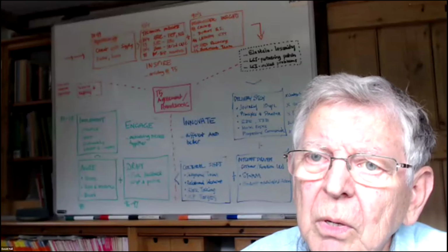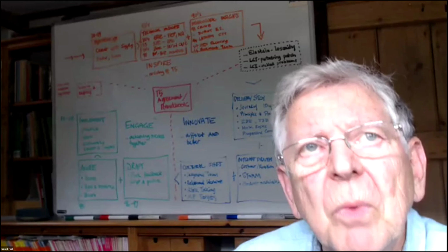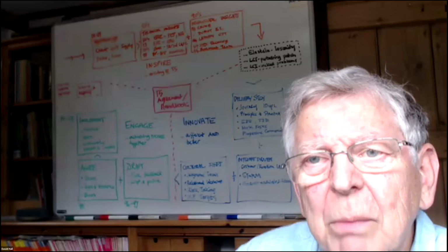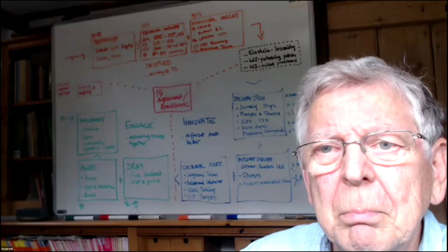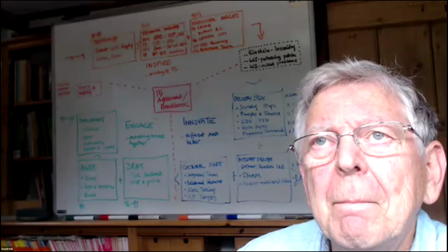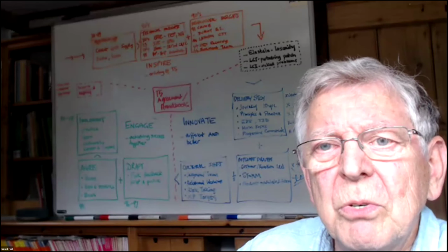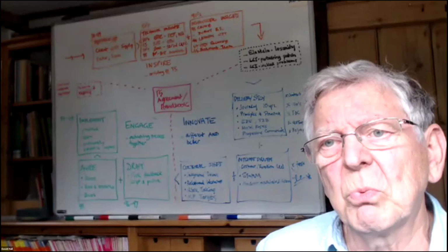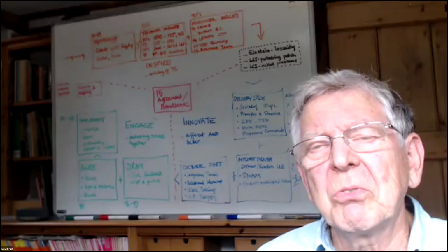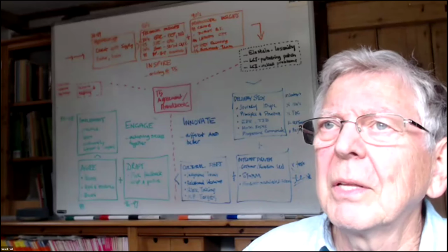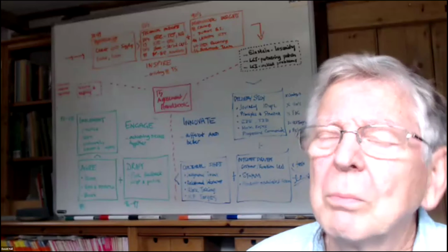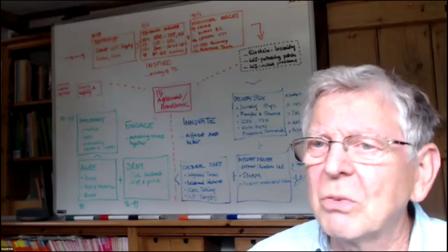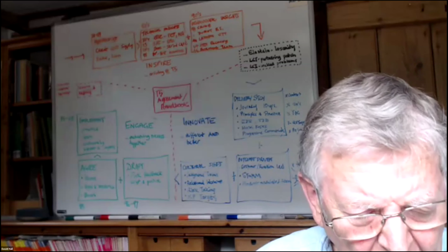Back in the 80s, I was working with Exxon Research and Engineering in the States, and they didn't spend a penny without producing a project execution plan at the start. They planned everything, and they tied the contract strategy to the project execution plan. They tied it to the quality. They tied it to the objectives. They looked at where the vulnerabilities were, and so they set out their stall before they started. That wasn't something I had really seen. When I got into a project, the architect did his architecture, the engineer did his engineering, everybody did their bit, but the grand plan was missing.